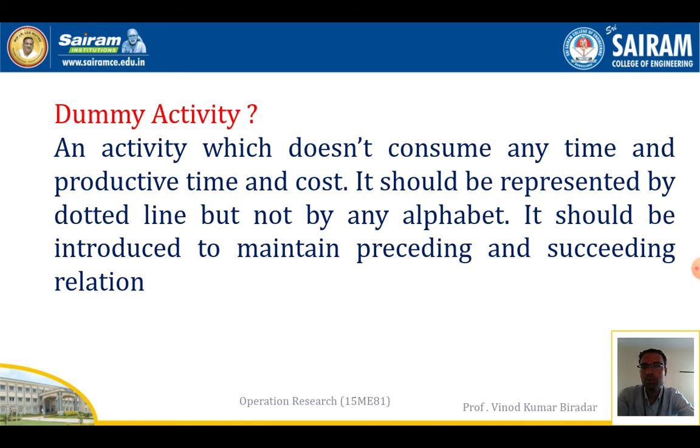Sometimes we use a dummy activity. What do we mean by a dummy activity? It is an activity which does not consume any time, productive time or cost. It should be represented by a line but not by any alphabet. It is introduced to maintain the preceding and succeeding relationships, in between them, to keep the given problem balanced.